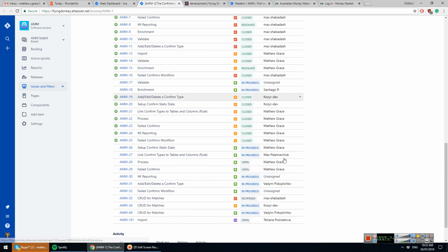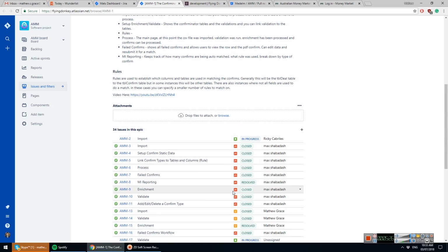There's going to be 4 types of tickets, and I'm going to set a ticket up for each type of task. Now, I know there's various different ways that Jira can be used. I've set Jira up in big companies with 200 people teams. You can obviously have a single ticket with a big workflow, etc., etc. What I have found though is if you have a single ticket with a very large workflow, comments and various things get lost throughout the piece. So what I've done is I've split them into 4 areas.